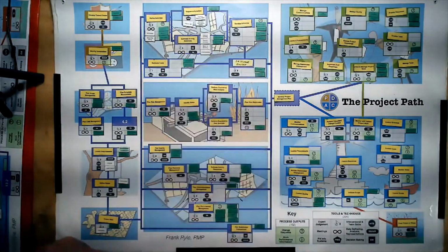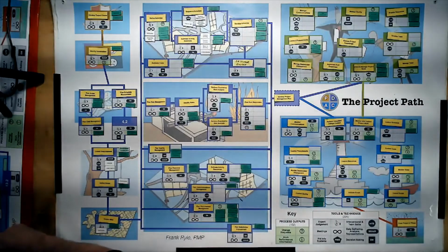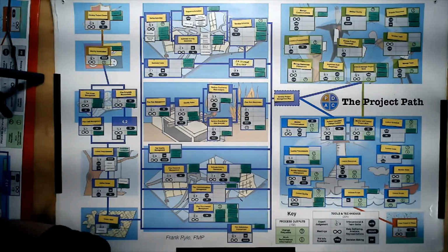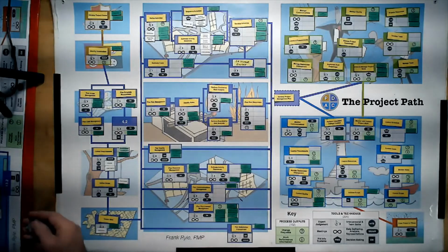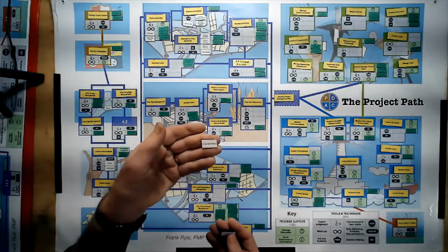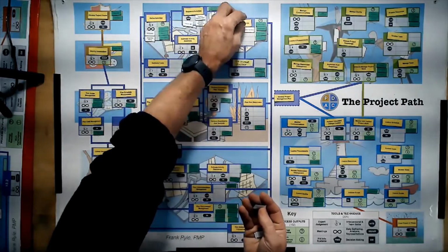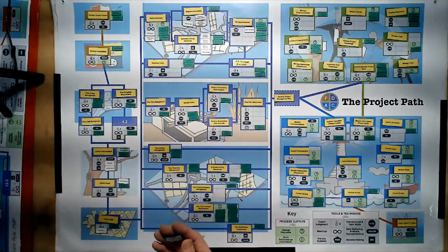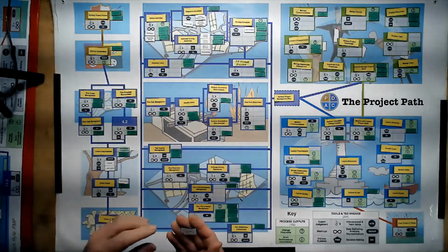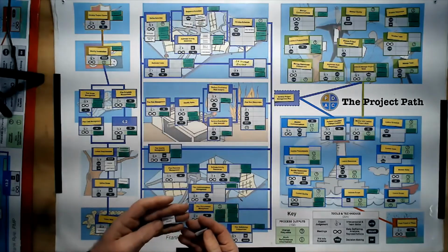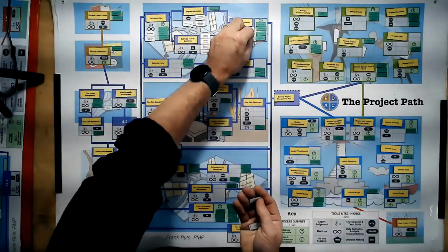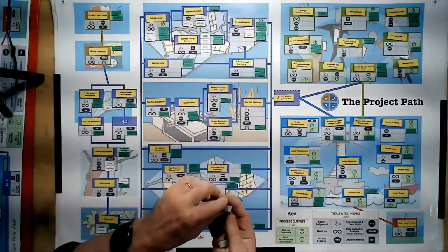Now you can see that Develop the Schedule has quite a lot to help us to get this done. And so let's have a look at these. So some of the things you might want to consider. One is the critical path method. Of course, the critical path method is helpful because it identifies the activities that are on the longest path. It identifies the ones that have float, and maybe we can do something about that. It's a useful technique. The schedule network analysis. Okay, that's helpful just to do an analysis of the network that we produced over here.